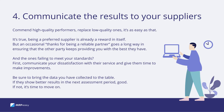Tip 4: Communicate the results to your suppliers. Commend high-quality performers and replace low-quality ones. Being a preferred supplier is already a reward in itself, but an occasional thanks for being a reliable partner goes a long way in ensuring the other party keeps providing their best. For suppliers failing to meet your standards, communicate your dissatisfaction and give them time to make improvements, bringing the data you have collected to the table. If they show better results in the next assessment period, good. If not, it's time to move on.